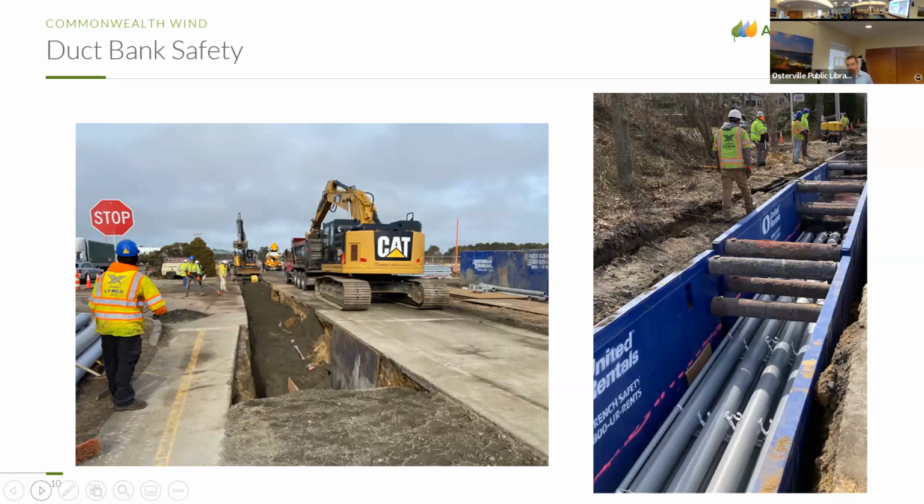In terms of protecting wildlife, certainly we'll avoid nuisance to wildlife by staying within the beach parking lot, but we're also going to need to comply with strict guidance and permitting requirements, especially from the Massachusetts Office of Endangered Species. Can't remember what NHESP stands for, but there's an office particularly that protects endangered species such as piping plovers and other endangered species. Roseate tern is another one. So we will be in full compliance with any of that and have observers on site within the parking lot when we're doing construction activity as required or appropriate. So hopefully that helps your question.